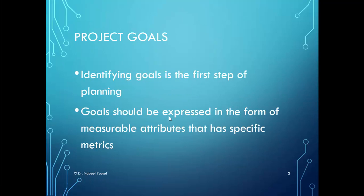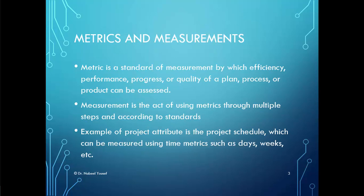Identifying goals is the first step of the planning phase. Goals should be expressed in the form of an attribute or attributes that can be measured using a specific metric. A metric is a standard of measurement by which efficiency, performance, progress, or quality of a plan, process, or product can be assessed. Measurement is the act of using metrics through multiple steps and according to standards.